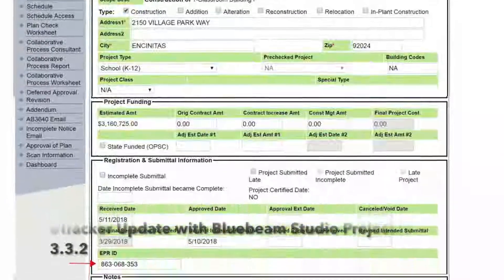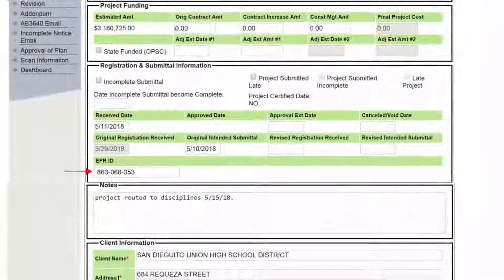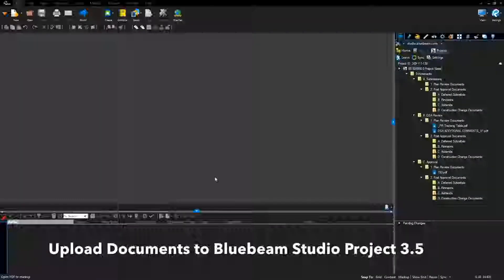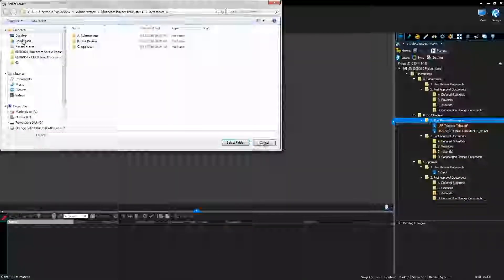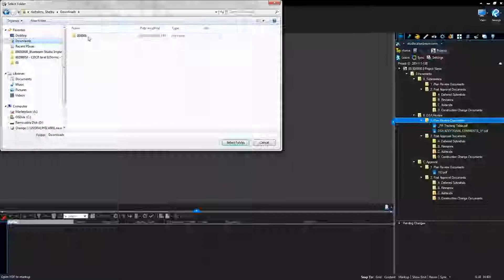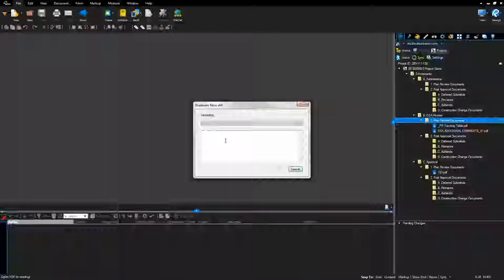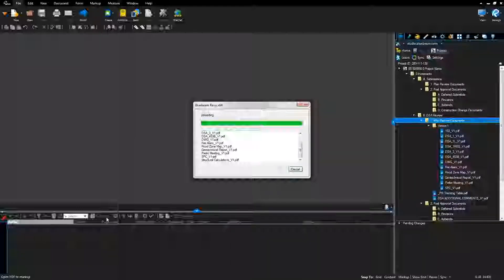Update the eTracker application screen EPR ID with the Bluebeam Studio Project ID. Upload the Version 1 submittal file folder: under DSA Plan Review, Plan Review Documents, right-click the folder and select Upload Folder. Go to Downloads, select the application number, select the Version 1 folder, and select Folder. Files will upload to the Bluebeam Studio Project.